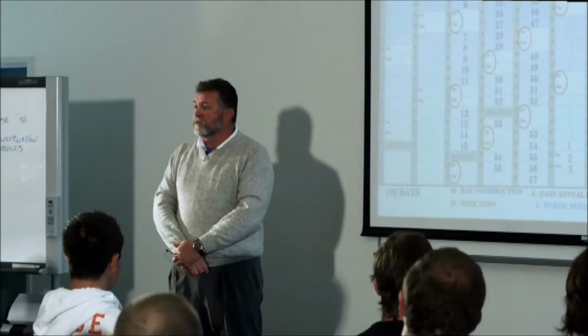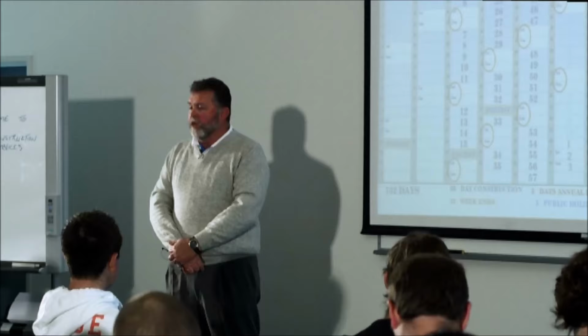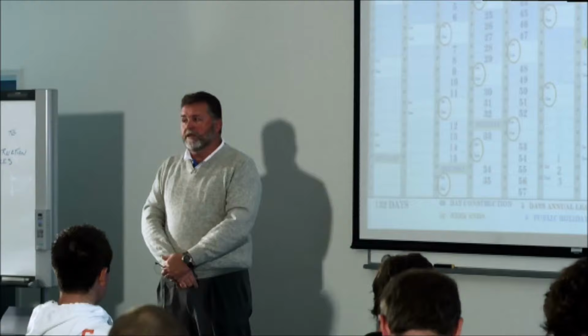So a time extension notice is a notice that you give to the owner. You're not begging for their approval. It's a notice that you're giving. And after that, we can have the dispute later on. That part is easy.